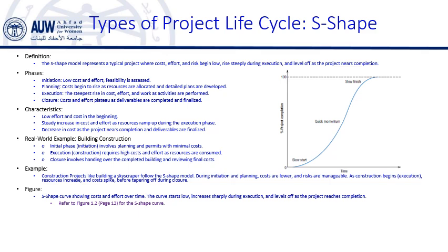When we go further, the planning phase typically marks the beginning of the S-shape. Once the foundation is set, the project moves to the execution phase. At this stage, the progress will accelerate rapidly. Here, most of the resources are committed and acquired, and the core deliverables are being created step by step. Effort and cost rise significantly as we are executing the project, and the project team works to complete the bulk of the work. This is the steep upslope of the S, as you will see in figure 1.2, page 13.